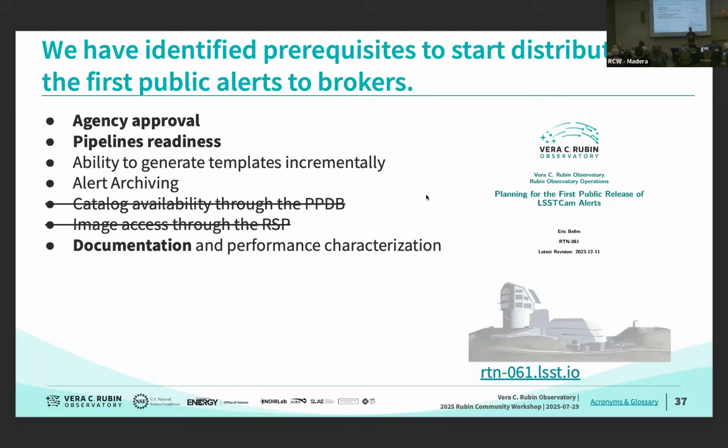And the alert archive is generally in good shape. We don't expect this calendar year to have the prompt products database or the prompt images available for technical reasons. And so the project is considering going ahead and distributing alerts to the brokers, even without those additional services being available. Obviously, that makes some degree of detailed analysis more challenging, but we think that our broker partners can still enable a great deal of real-time science even without those.